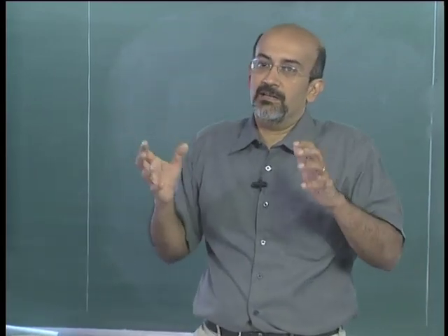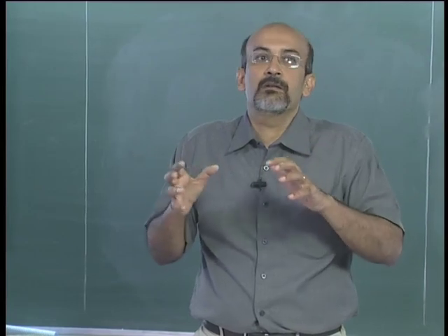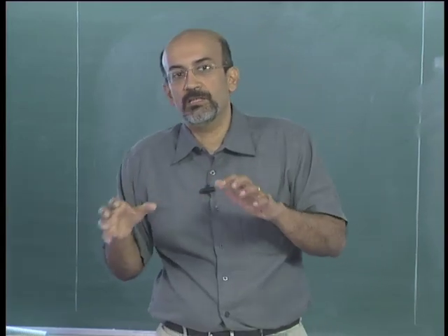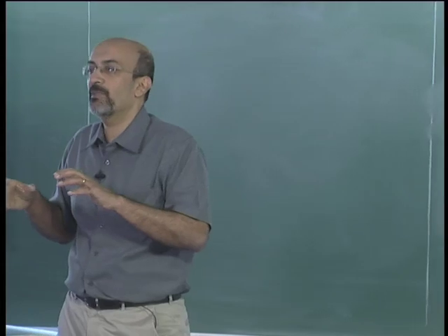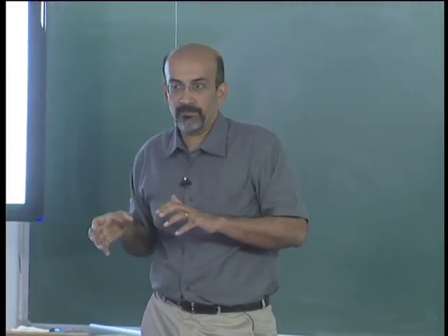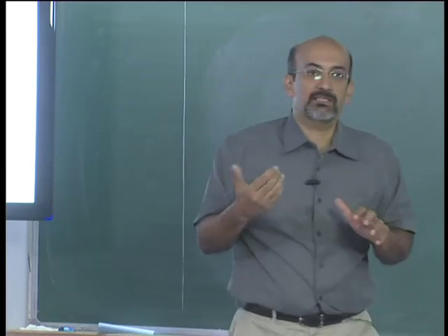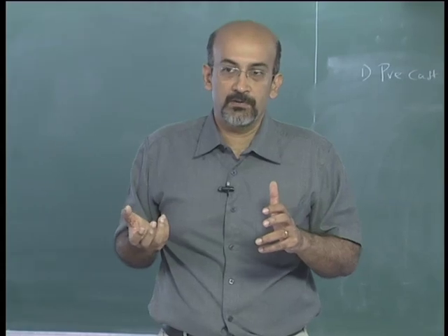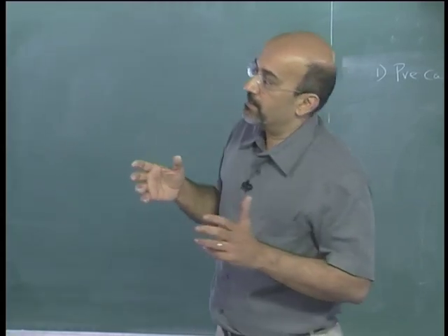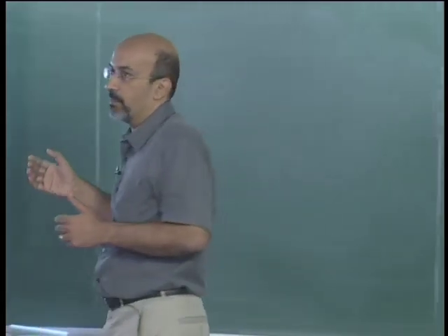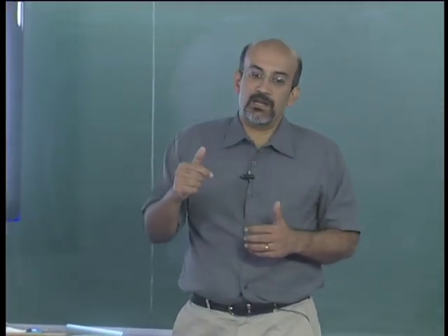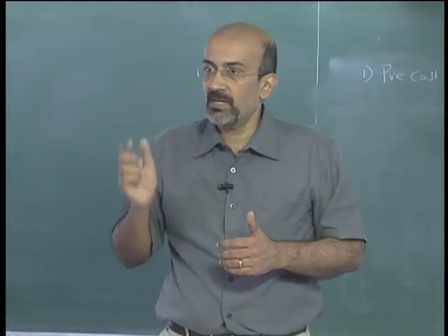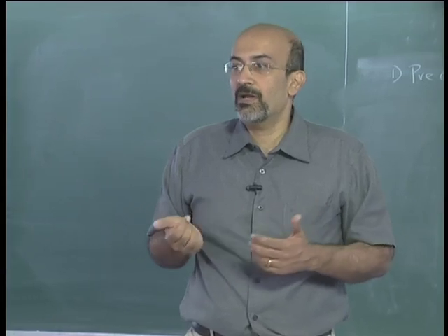Generally in construction, that is one of the most common ways and probably the easiest way to break down, because components are physical. But a lot of times, say for project management of a service, you cannot break it down by component. In construction, yes, you can a lot of times break it down by component, but we have to realize that breaking down by component is still only one view. We might require other views of the project.